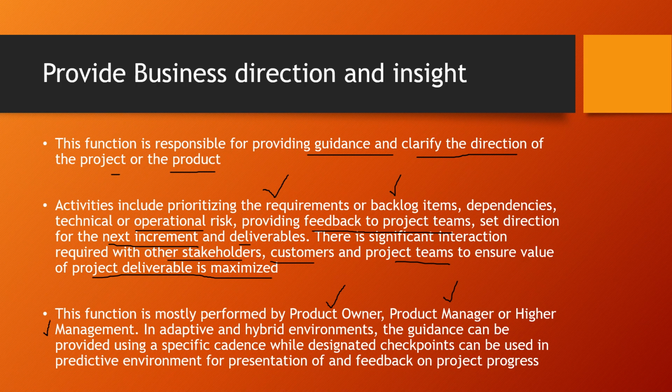When you do not have a product owner or a product manager, you are working in, let's say, a services environment, not a product environment, right? So higher management is going to perform this function. In adaptive and hybrid environments, the guidance can be provided using a specific cadence, like let's say every sprint, every 2 weeks, every 4 weeks, right? While designated checkpoints can be used in predictive environment. So when you're talking about waterfall model, you may have specific checkpoints or decision gates or milestones that can be used to perform this function for presentation of and feedback on the project progress.